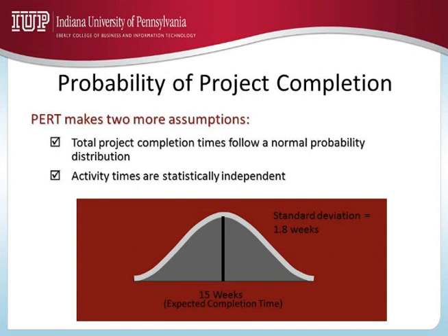The two extreme points here in the standard normal distribution: this is mean plus 3 times standard deviation, this is mean minus 3 times standard deviation. And that will cover 99.74% of the area under the curve.